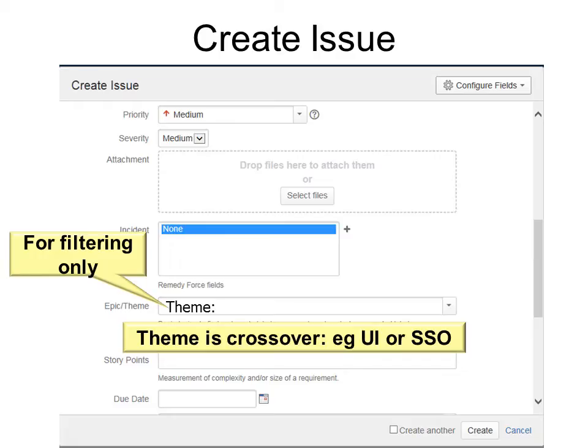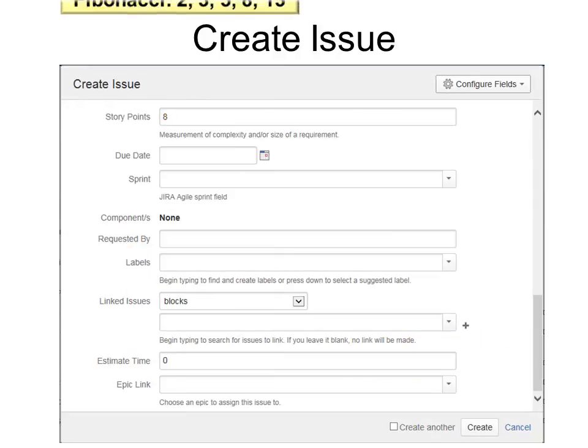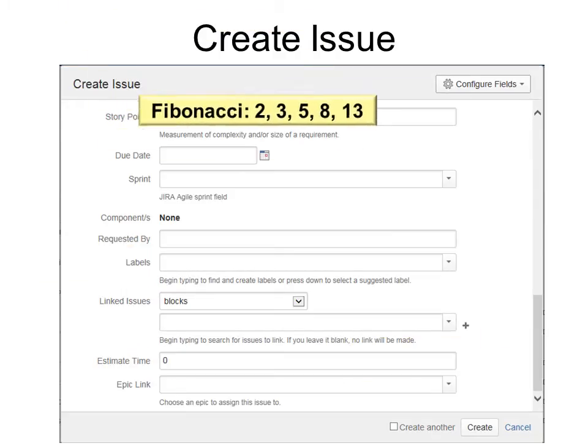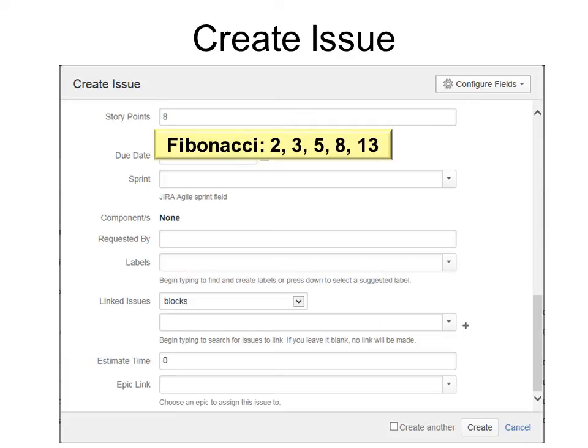I want you to think of a theme as a crossover. For example, user interface or single sign-on. Those would be crossover to different epics. Story points are based on Fibonacci. If you're using Fibonacci, remember it's 2, 3, 5, 8, 13, etc.